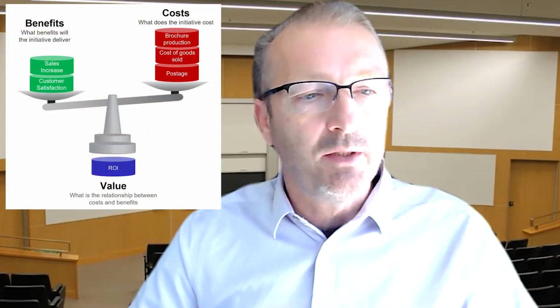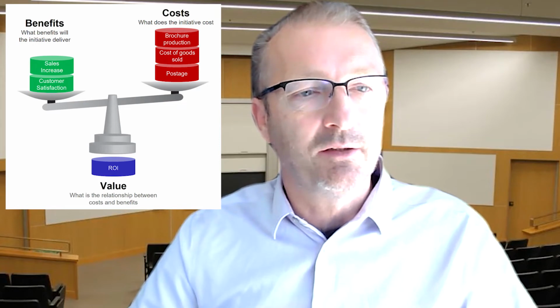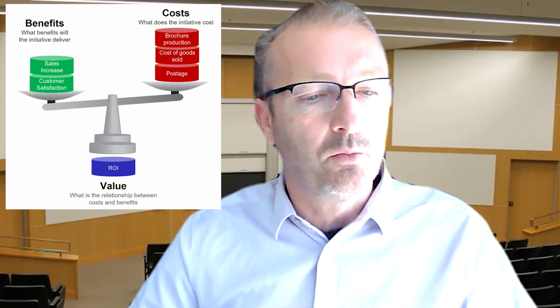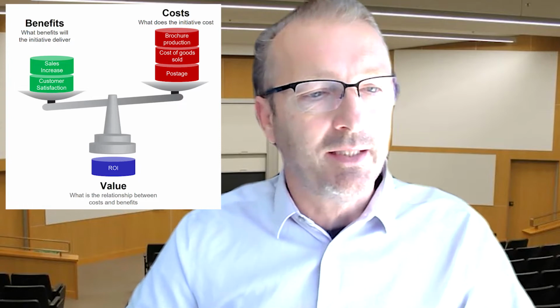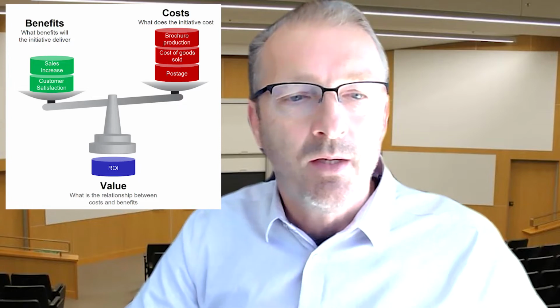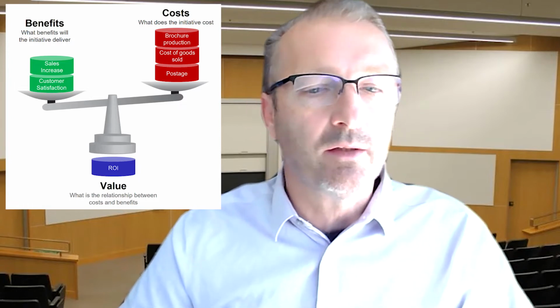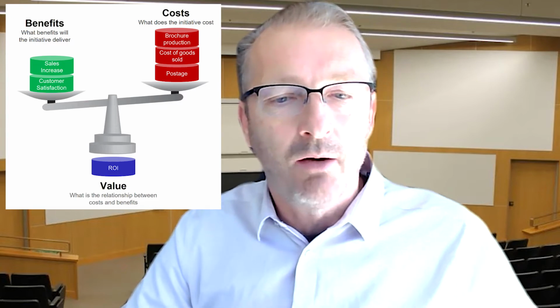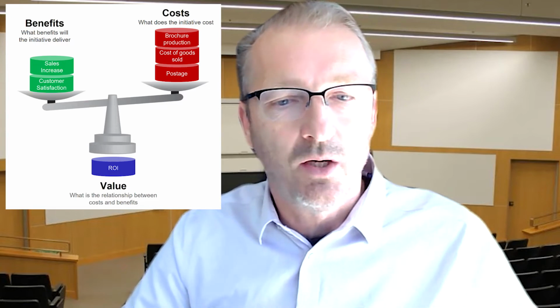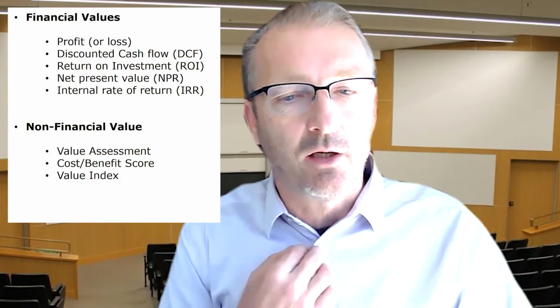Now, the value is then the last step that we need to evaluate. So what are value estimation? Well, basically, it is relating benefits to cost. How can that be done? Well, if you only look at the financials for a moment, relating financial benefits, financial costs would actually be evaluated by a profit evaluation. Could also be that instead of the profits, we look at a discounted cash flow.